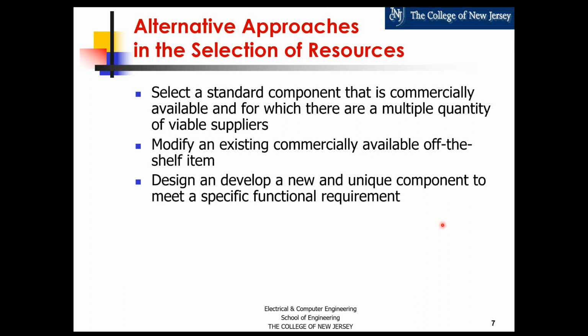You really have to do an analysis, and it's mostly a financial and scale analysis, depending on the resources that you have from an engineering perspective, to decide whether you use something as is, or take something that exists and modify it, or do something from scratch.